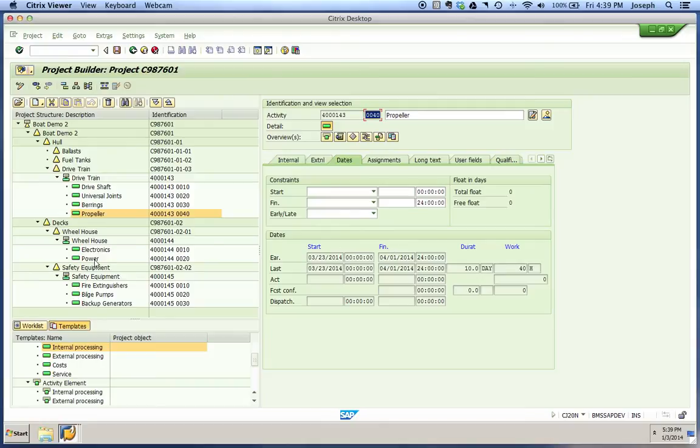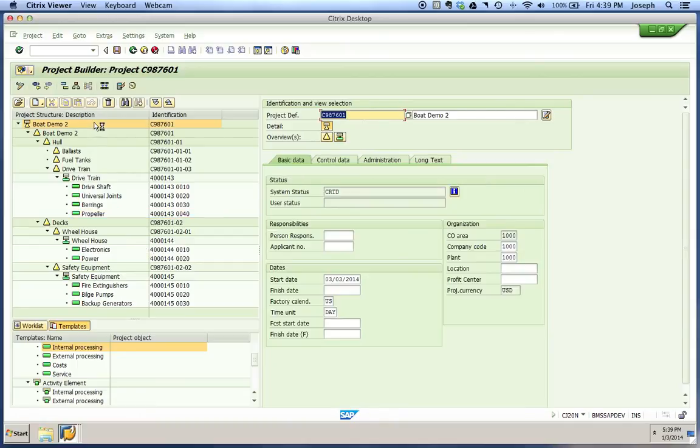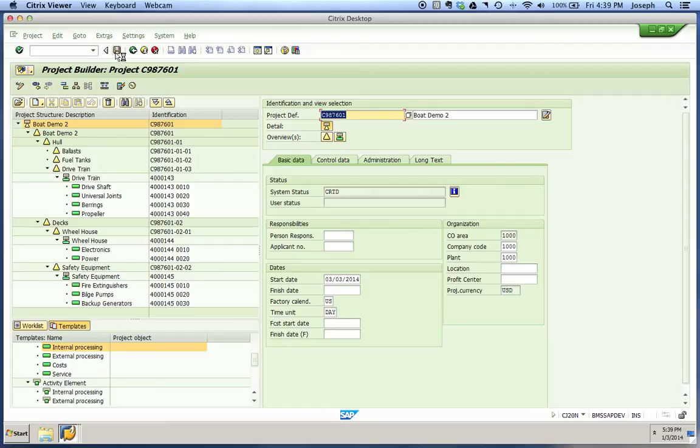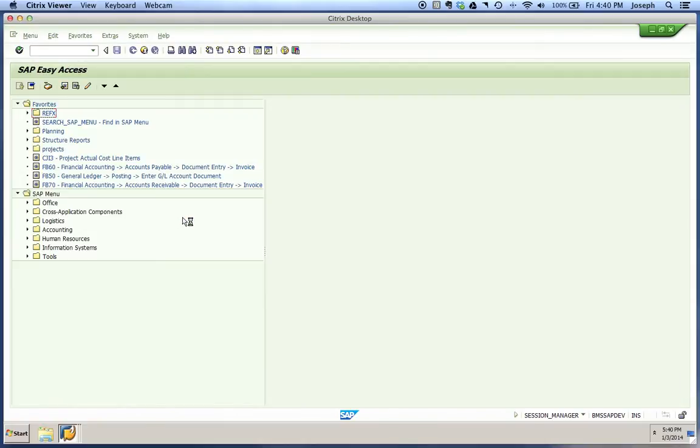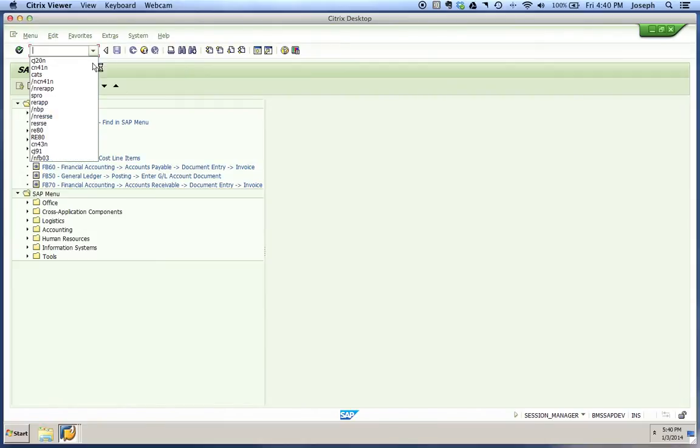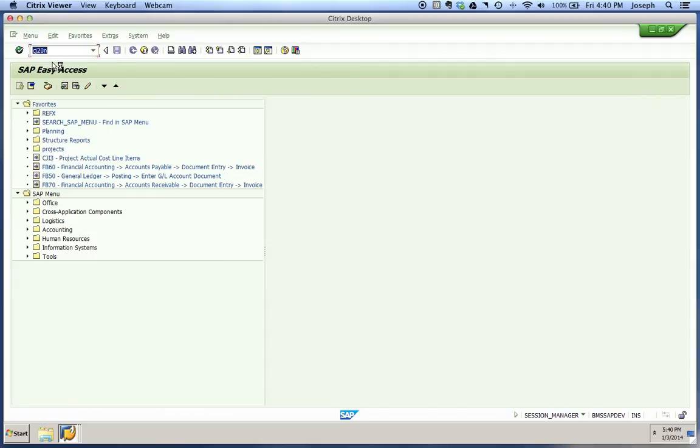We had a similar relationship between our bearings and propeller. We had to finish our bearings before we could start the propeller, so that one starts on 3-23 and goes to 4-1. You can navigate through the rest of your activities. Before you do anything after that, we're going to make sure we do not save our project here. We're going to back out and tell it not to save.